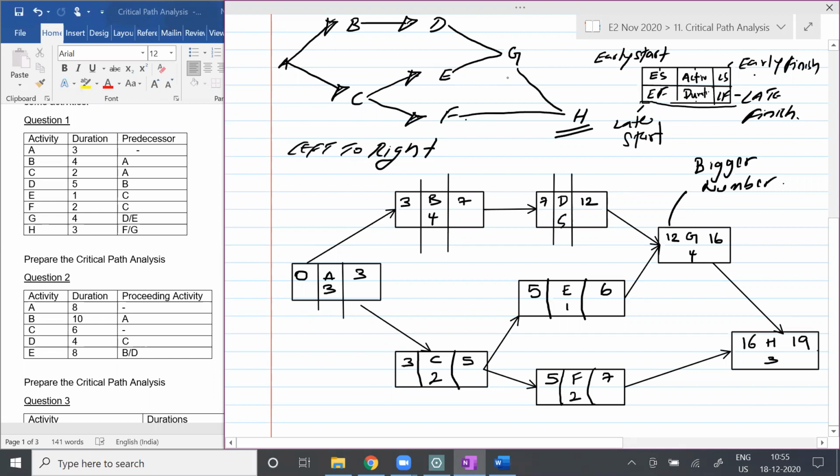So, small issue: we have to consider all the projects. That's why we are taking the bigger number as 12, right? Correct. Because Malit, if these two finish only, this can start. Now, if this finishes within 6 weeks, still you can't start it, because this also must finish. So maximum you should wait until this also finishes. You get the point. Are you clear with what I'm saying there, Malik? Any questions, Malik? No, okay.